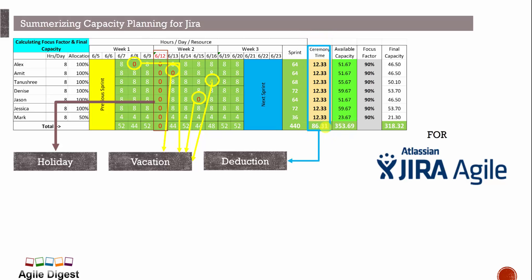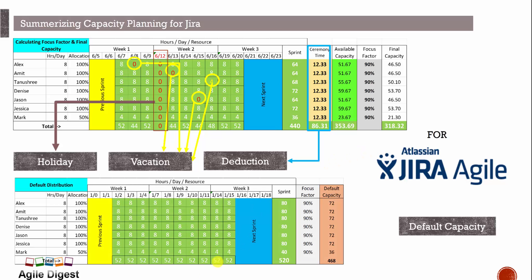The default capacity in Jira will only calculate with the focus factor applied. The full capacity without vacations or ceremonies would be 72 hours for everyone and 36 hours for Mark. We'll enter these values into Jira, see how capacity is displayed, then create and assign tasks to see how capacity updates.